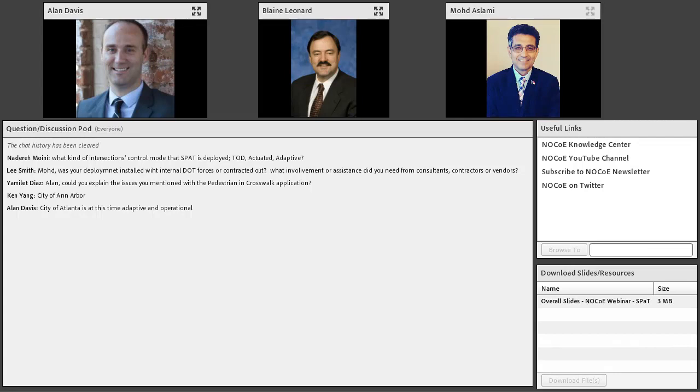Yeah. Maud, what was your biggest surprise that you ran into, thinking back about your operational SPaT deployment? Well, like I said in the beginning, our biggest challenge with the initial vendor was the technical support and availability of documentation. So when we rebooted and restarted the process of multiple vendors evaluation, we found that the 2 vendors that we selected, CAPS and Lear, without a whole lot of effort, the interoperability existed.